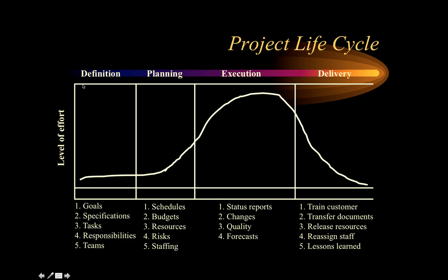We specify in the definition phase the goals, the project specs, the tasks that need to be done, the responsibilities, the teams, the communication requirements, how we'll interface with our stakeholders, and so on. So you do a lot of pre-planning that allows you to move that project forward fairly smoothly.